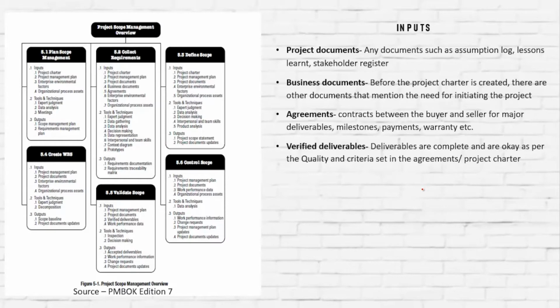But before even the project charter is created, there are different discussions that always happen: why are we doing this project? What is the need? What will be the benefits out of it? Who will benefit from this project? And all these discussions are done before the project charter is created. And these documents are really important, and these documents are known as business documents.